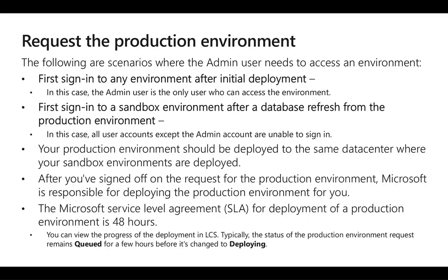If the DSE team has questions that prevent them from deploying the production environment, they will add a comment to the service request. For example, the DSE team might ask us to update the subscription estimation or change the data center. In some cases, we might have to clear the sign-off from the production deployment request to make the changes.